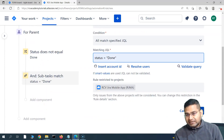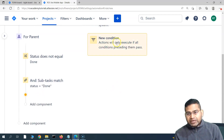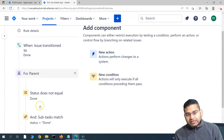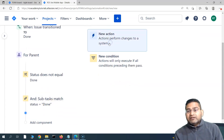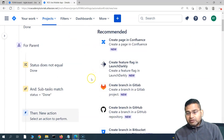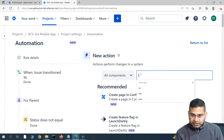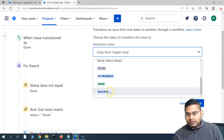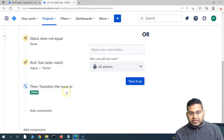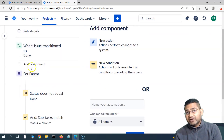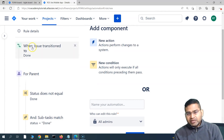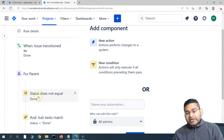I'll add the action. If all conditions are true — the parent is not done, the issue was transitioned, and all other child issues in the parent are actually done — then trigger the action: transition the parent issue to 'Done'. I'll simply say 'transition the issue' to Done and click Save. So this is basically what the rule looks like: when an issue transitions to Done and its parent has all subtasks completed, the parent gets closed automatically.